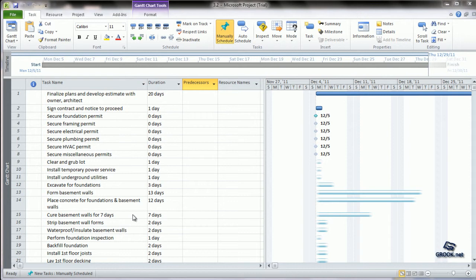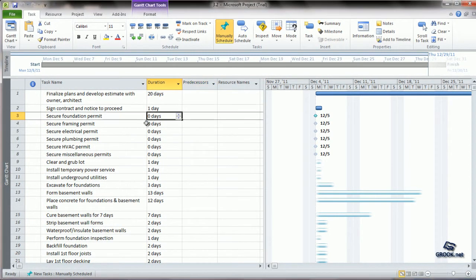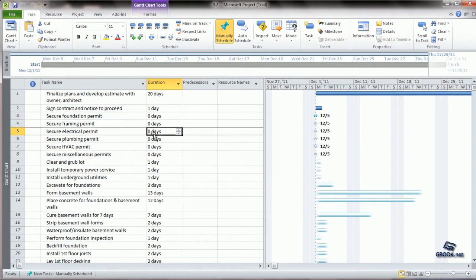So typically when we enter zero as the duration for any task, it automatically is marked as a milestone. You can see on the chart side that this diamond shape is a symbol for a milestone. All tasks for which zero days are marked as the duration are shown with this milestone mark.